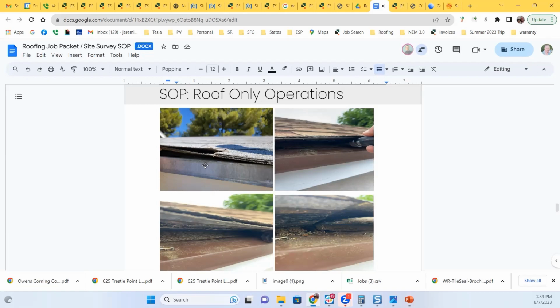And this is how you check for the layers. You just take the first shingle, and then right underneath that, there's something called a starter strip, which is the second shingle, right? So the first 2 shingles, those are usually the first layer. And then you'll likely see like a black felt or some sort of underlayment under that. And then if you lift that up, sometimes you'll see, like in this case, there's a second layer underneath where you lift it and you don't see wood below the felt. You see another granulated surface. That's the second shingle layer.